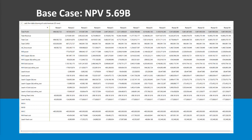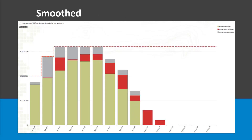But I don't necessarily like all the variation we were seeing in the mining and in the processing. The next step — what many mine planners go through at any site — is to run their base case, see what it looks like, and understand what the software wants to do. Now that I have a result, I'm going to go in and start smoothing things and adjusting them to add practicality that's hard to describe to the software. You can't throw in all these smoothing constraints at the beginning because you might eliminate a schedule that triples the NPV. So I've put in what we call difference constraints, as Ian discussed in his presentation.